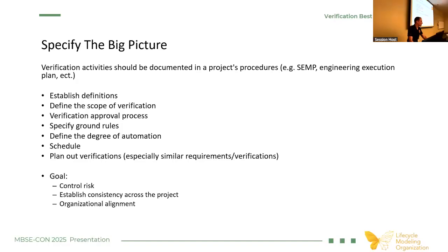Likewise, who actually does have the approval authority to say that a verification is done and complete? So having that process defined, whether it's a self-approval where a project's just verifying everything internally so that they can keep accountability of that, or is there some sort of external approval that has to be had from the customer? Those are the types of processes that need to be hashed out well in advance so that everybody understands their specific responsibilities and that delineation of who's doing what.